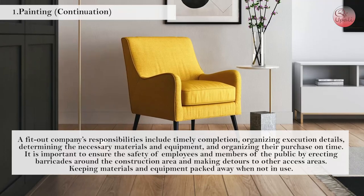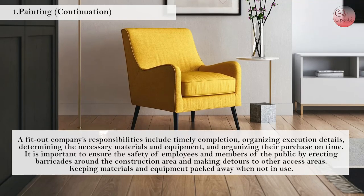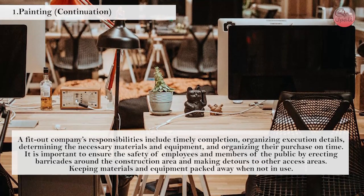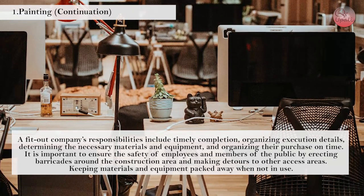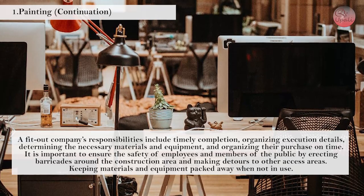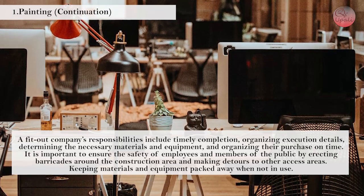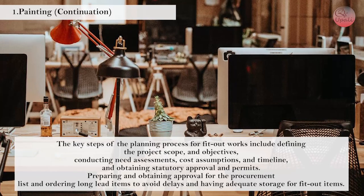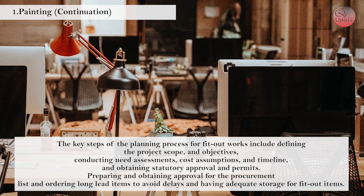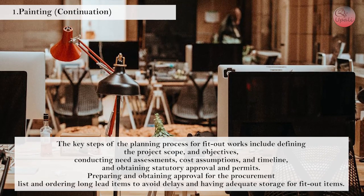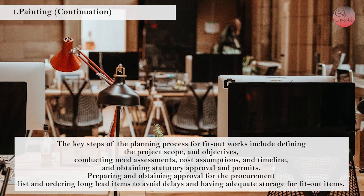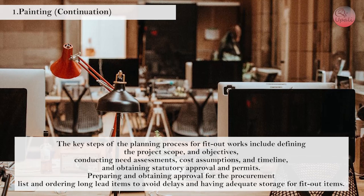A fitout company's responsibilities include timed completion, organizing execution details, determining the necessary materials and equipment, and organizing their purchase on time. It is important to ensure the safety of employees and members of the public by erecting barricades around the construction area and making detours to other access areas, keeping materials and equipment packed away when not in use. The key steps of the planning process for fitout works include defining the project scope and objectives, conducting needs assessments, cost assumptions, and timeline, obtaining statutory approval and permits, preparing and obtaining approval for the procurement list, and ordering long-lead items to avoid delays, and having adequate storage for fitout items.